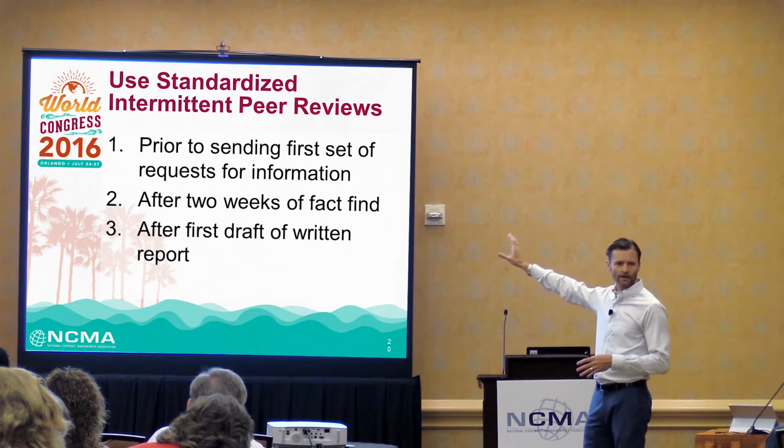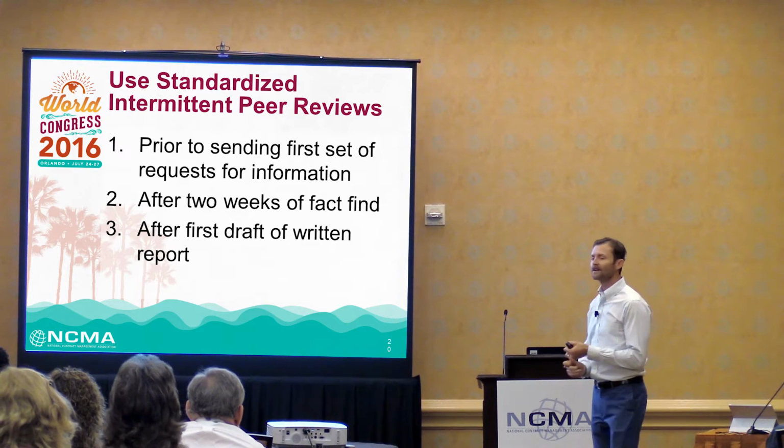And this is when we have had the most luck. First, prior to sending out those first RFIs, those first requests for information. So as I mentioned, and I'm going to keep saying it, laying out that cost analysis report and building your RFI worksheet so you've got all of your fact find notes in one worksheet. Before you send that to your supplier, or the analyst sends it to the supplier, we do a peer review.